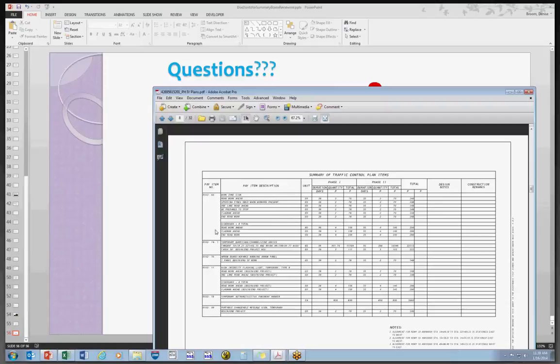Okay, this is an example of too much detail. We're looking for a summary. The work zone sign, and that's it. This breakdown should be seen in their backup documentation, but not here. This is way too much information.